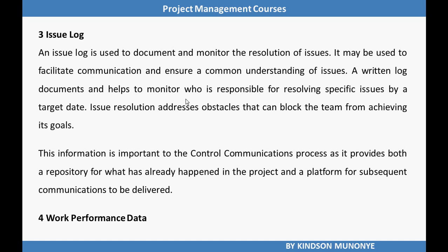An issue log is used to document and monitor the resolution of issues. It may be used to facilitate communication and ensure a common understanding of issues. A written log documents and helps to monitor who is responsible for resolving specific issues by a target date. Issue resolution addresses obstacles that can block the team from achieving its goals.